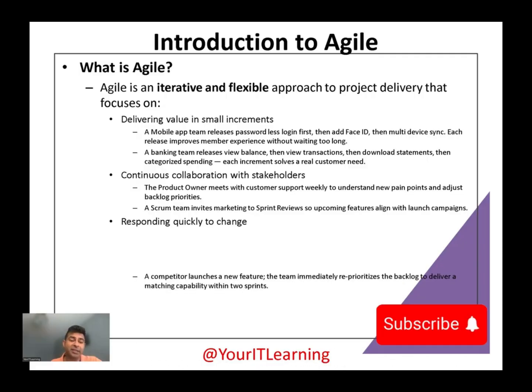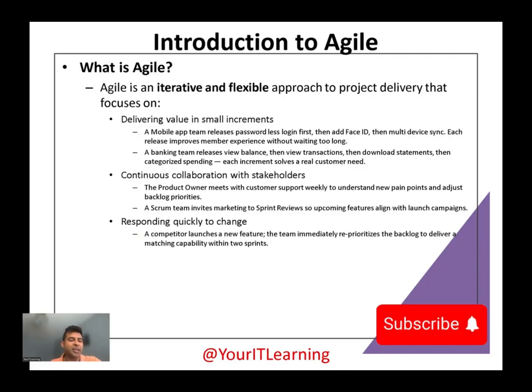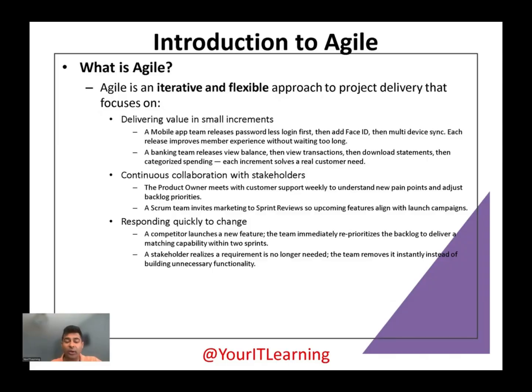Responding quickly to change. A competitor launches a new feature, and the team immediately reprioritizes the backlog to deliver a matching capability within 2 sprints. So now we have realized our competitor is launching something that we feel will be really beneficial to our members, so we are accommodating that in our backlog. A stakeholder realizes a requirement is no longer needed. The team removes it instantly instead of building unnecessary functionality.